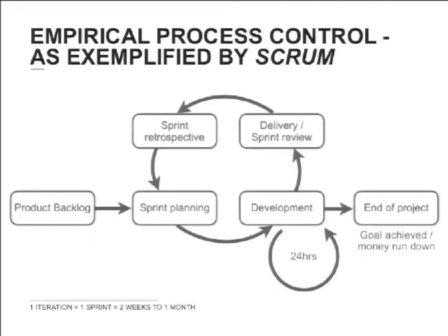So instead of measuring the time for these individual steps, you set a predefined amount of time. It's all built around this thing called time boxing, which just says we'll work in 2-week iterations or 3-week iterations. At the beginning of the project, you just set that, and that is the fixed amount of time. So instead of having all these flexible amounts of time, you work with a set piece of time, and it gives a rhythm to the project. And at every step after the iteration, you do this exercise here, and you look back.